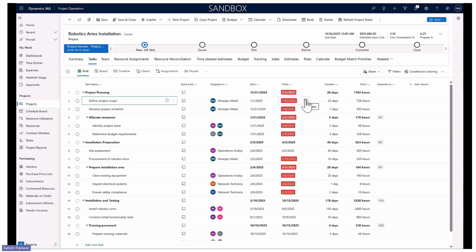Whenever there is a change in the task or the schedule or any needs of a particular project, you come and update the plans. Once you reach a stage where your plans are updated completely, you want to bring the updated plans into your new revised budget. You could do that by revising a budget and re-importing from the estimates again, or from any of the sources again.